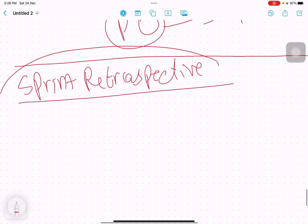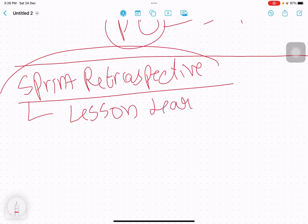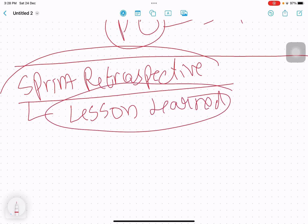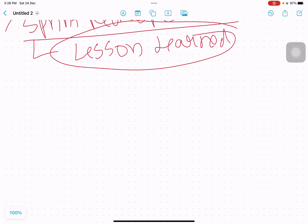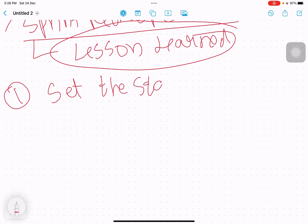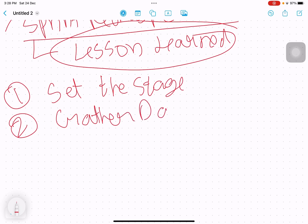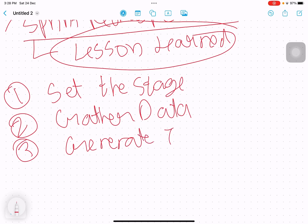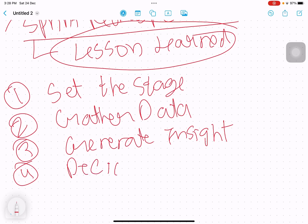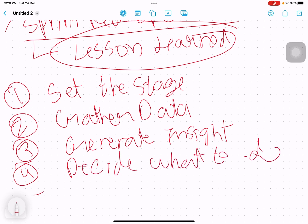The last ceremony in Agile is the sprint retrospective. The sprint retrospective is essentially a lessons-learned meeting. Its purpose is to extract lessons from the sprint. It is a five-stage process: set the stage, gather data, generate insights, decide what to do, and close the retrospective.